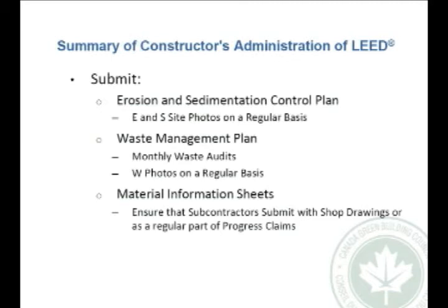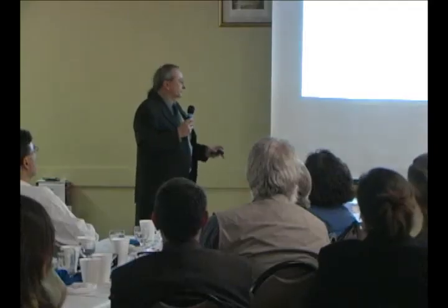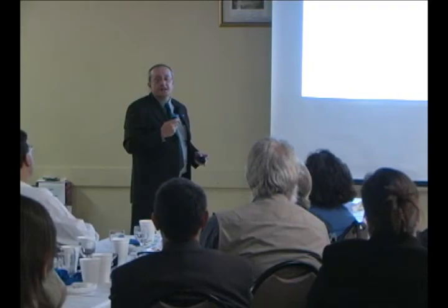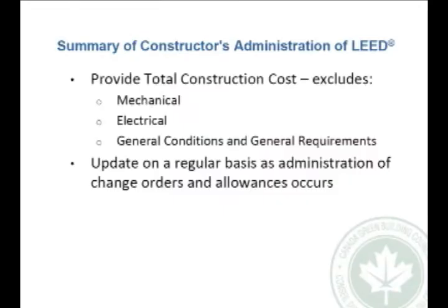You don't make a payment for any material that arrives on site until you've got these up front to prove that you're getting what you asked for. And the other part is to make sure, as through any construction and design process, that there are change orders that come about, supposedly equal materials of lesser cost for savings to the owner, or that are more readily available. You have to be very careful with those because they may not meet the initial requirements. So again, our representative on site has to be aware of what the requirements are when they're looking at these proposed changes.